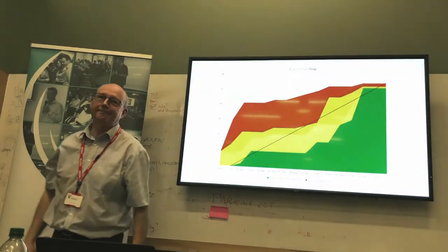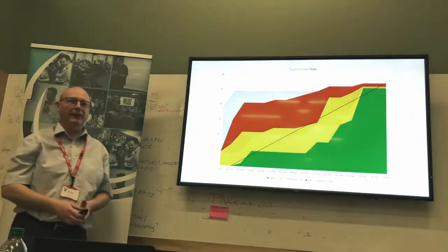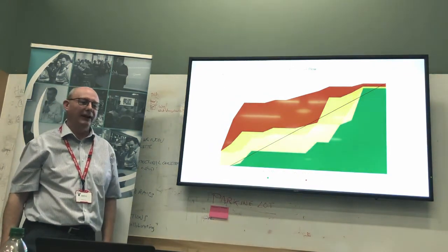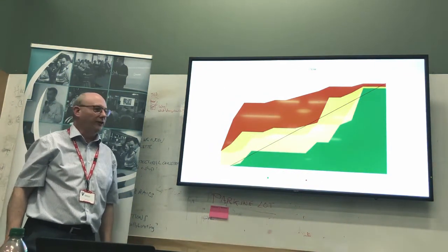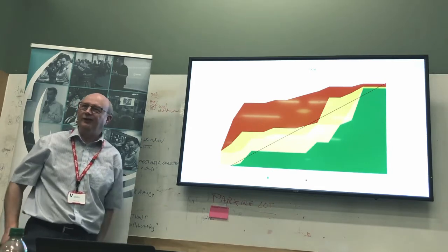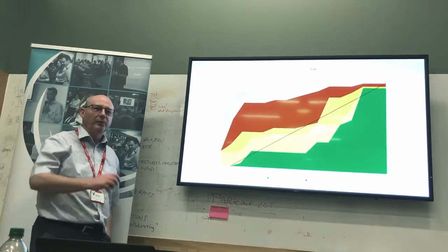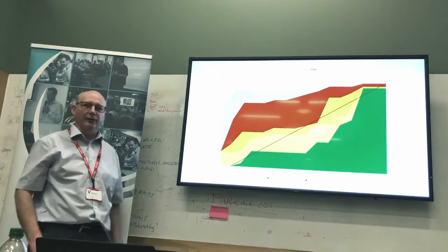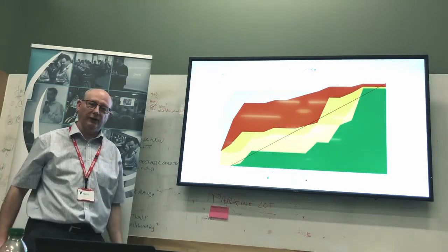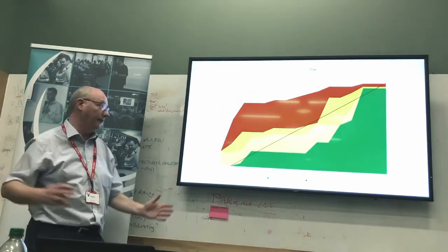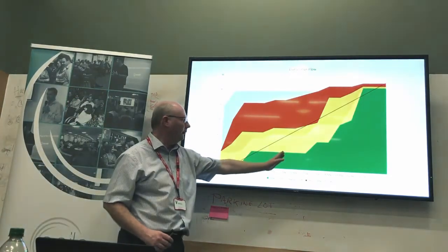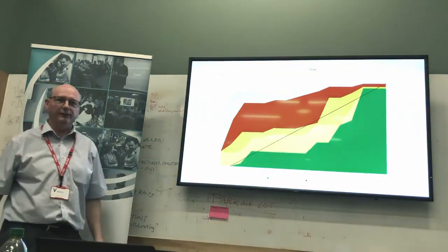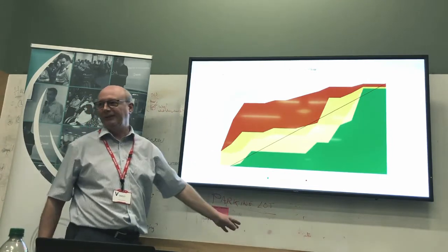We had a hackathon. Now, you know what happens with a hackathon? You say, oh, we'll spend Friday on a hackathon. Well, actually, Thursday night. Well, actually, it starts at Thursday lunchtime, doesn't it? But that means the people who are going to be on the hackathon come in late on Thursday. And they think about the hackathon, they don't do any work. So that's the whole of Thursday. It might only be a 24-hour hackathon, but the whole of Thursday is unproductive. And then, of course, because you've had them working for 24 hours, you have to give them Friday off, don't you? So that's Friday, unproductive.